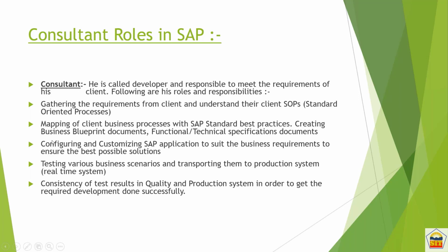Then it is saying that we will start doing the configuration after all this documentation. We will start doing the configuration, customization in the system, and we'll be doing the testing. And we will also ask the business to do the testing so that we should be on the same page. There should not be any gap. And after that, we can move that solution to the actual system, which will be used by the business for their day-to-day business activity.